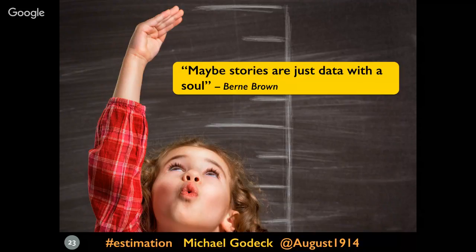Now, when story decomposition in backlog refinement works, it reduces uncertainty about what can go into work so that prioritization is meaningful, and the development team can then pull from a prioritized backlog according to their capacity, at which point the work is subject to more in-depth estimation. So now we have different kinds of estimation. We have estimation in backlog refinement, estimation in technical planning, estimation on project planning scale, and estimation on enterprise scale. They're different. They're all subject to the same principles, but the practices will be different for each.